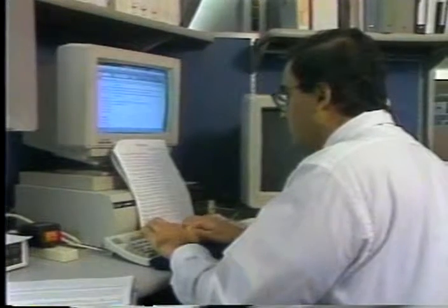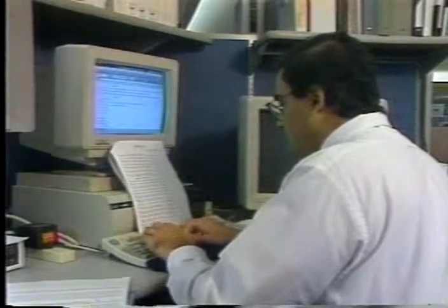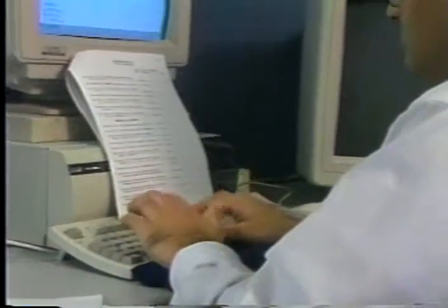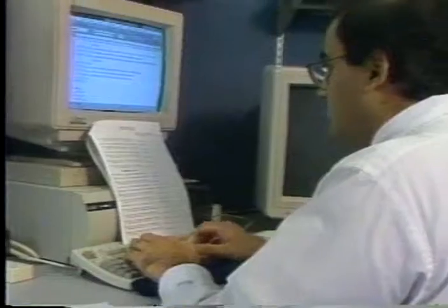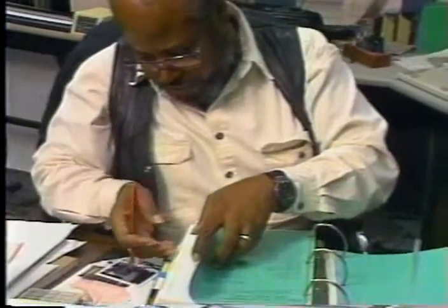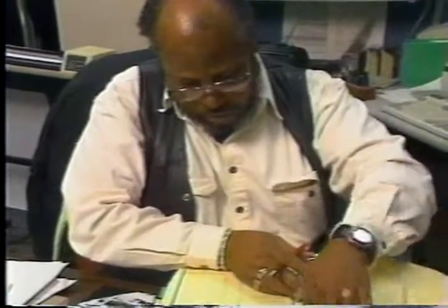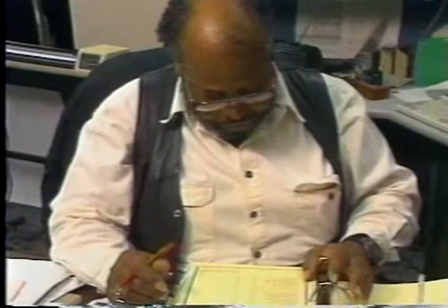The many different contract situations make it difficult to establish effective and meaningful minimum staffing guidelines. However, an outline of major work items for each contractor operation and the type of attention required, one-time, intermittent, or full-time, can be developed.